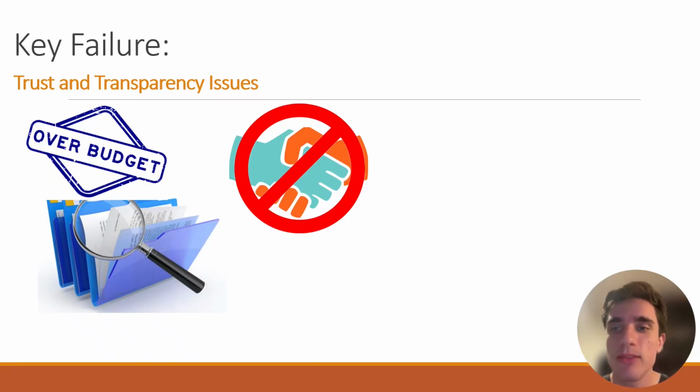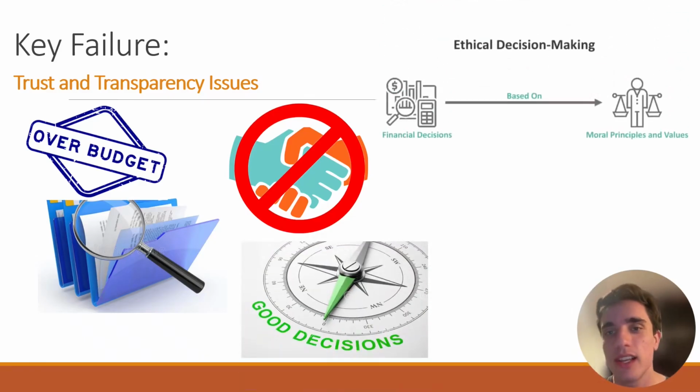The strongest example is the Leppington Triangle land acquisition. The ANAO found that the Department of Infrastructure did not exercise appropriate due diligence in acquiring the land, and that aspects of the department's operations fell short of ethical standards. The ANAO also found that the evaluation approach inflated the value of the land, causing the Australian government to pay far more than what was needed.